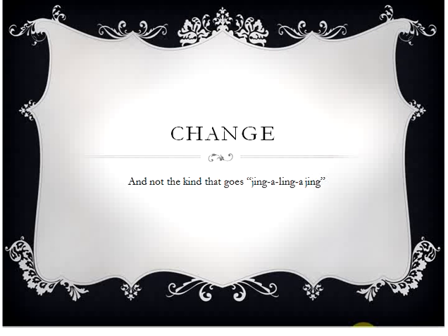You can have a PowerPoint that is looping or a video that's looping that is describing the change and visually showing you how to do the new documentation from screen to screen. You can use a Camtasia type product and actually allow the user to participate in clicking on the screens. They can practice how to do the change. You can provide them with access to a test environment and a login that allows them to go in and practice the documentation and play with it and see what the change is like.